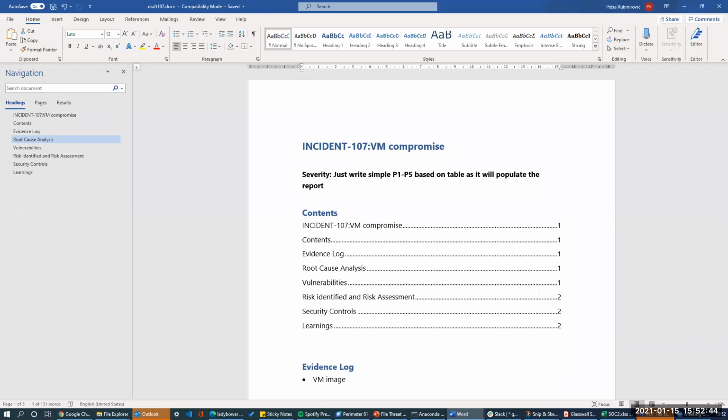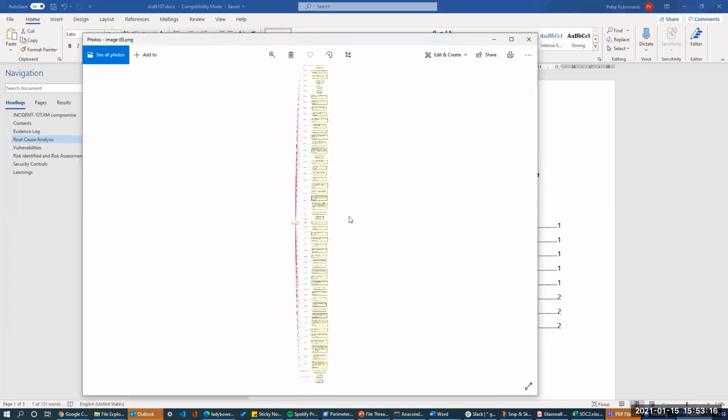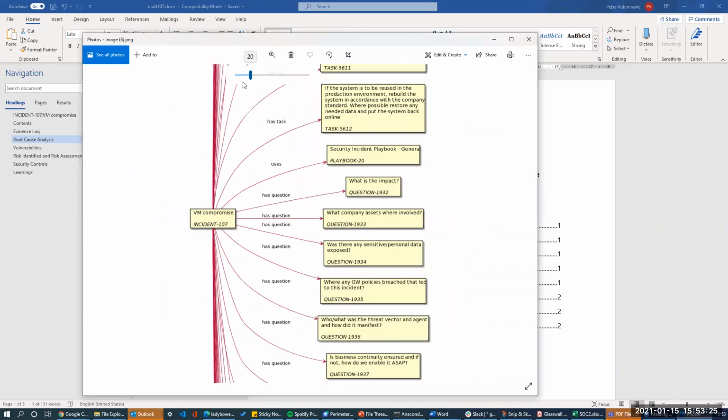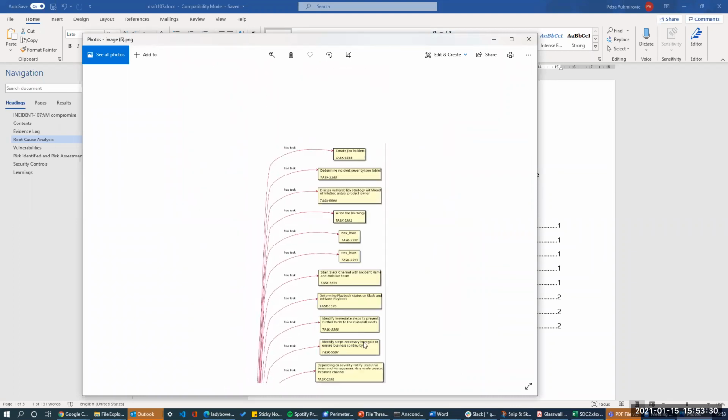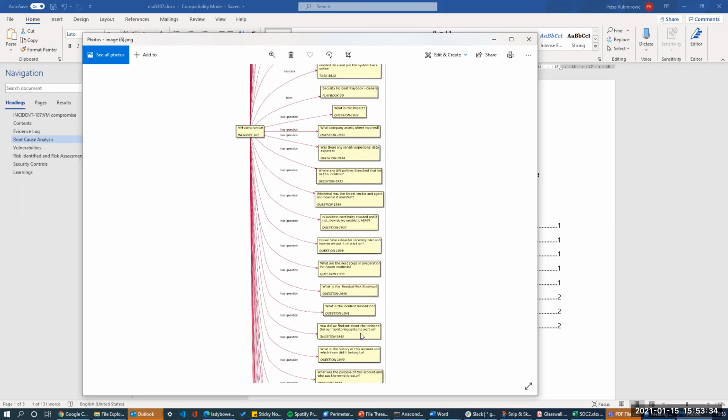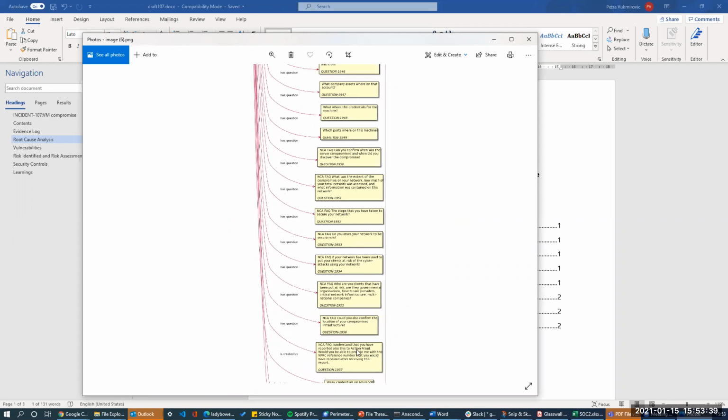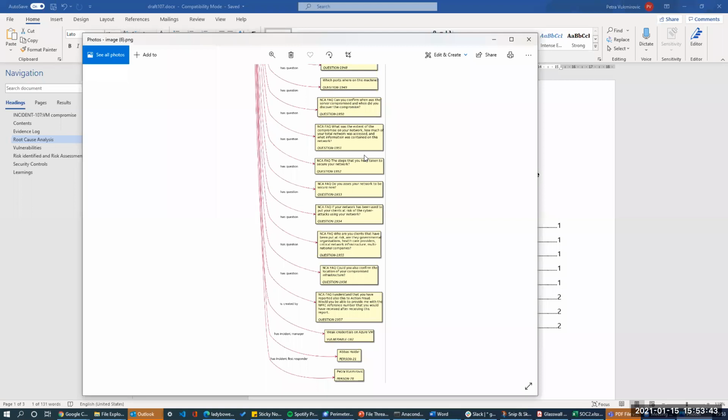And Luke, do you want to add some comments on your role in the team that is actually helping to make this happen? Yeah, of course, happy to. As you can see, the more of our organization that exists on Jira, the better for us. It allows us to get good visibility. For me, it's good measurement: the more we can see, the more we can measure, and then the more we can manage. We have people working almost full time, some contractors, some freelancers, some employees. We have functions which run on a continuous basis every 10 minutes or so, which export all of our Jira issues into an Elastic database, which we then query to build the graphs. So we're using pandas, Python, and Jupyter notebooks to query all the issues which live in Elastic.